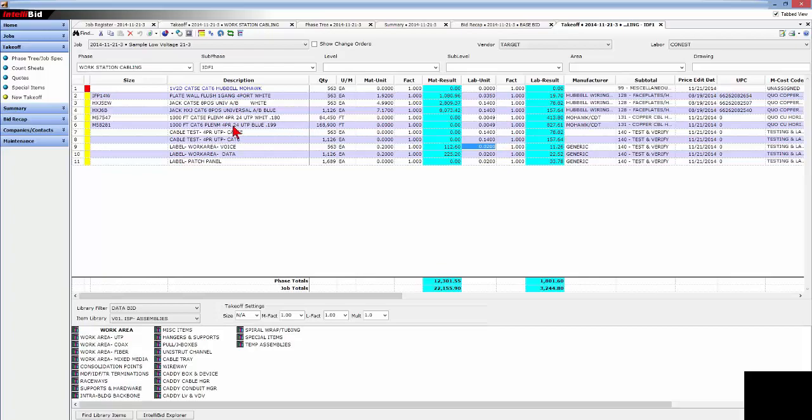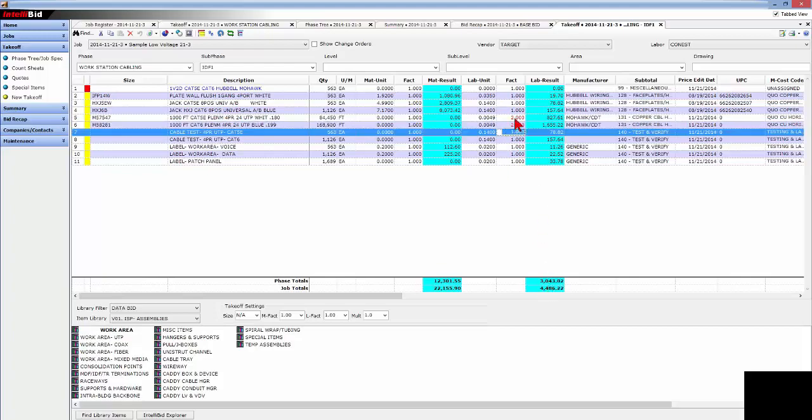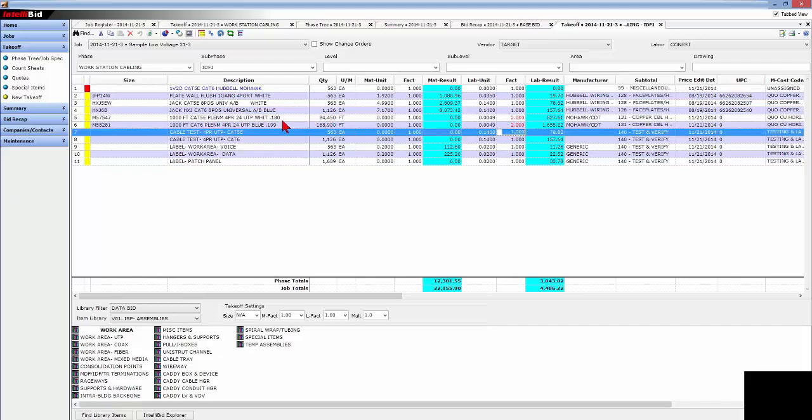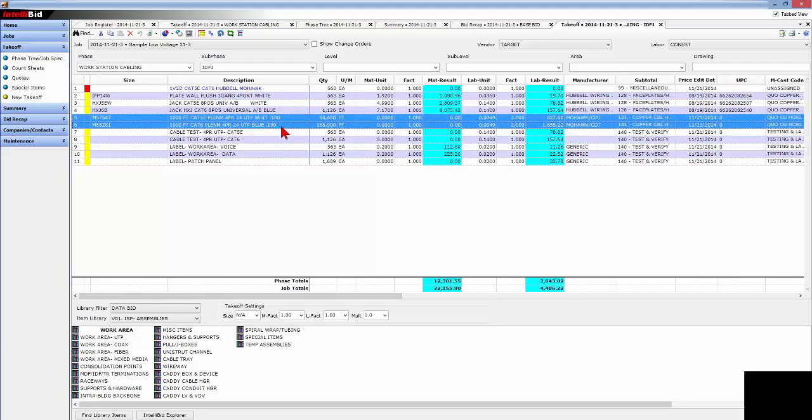So in a case like this, I may decide in a 40-foot ceiling that the cable placement might warrant doubling the hours. Now, we went from 3,244 hours and very quickly shot up to the 4,486 hours. But we only did it in 2 lines on the estimate, and not the rest of this individual task.